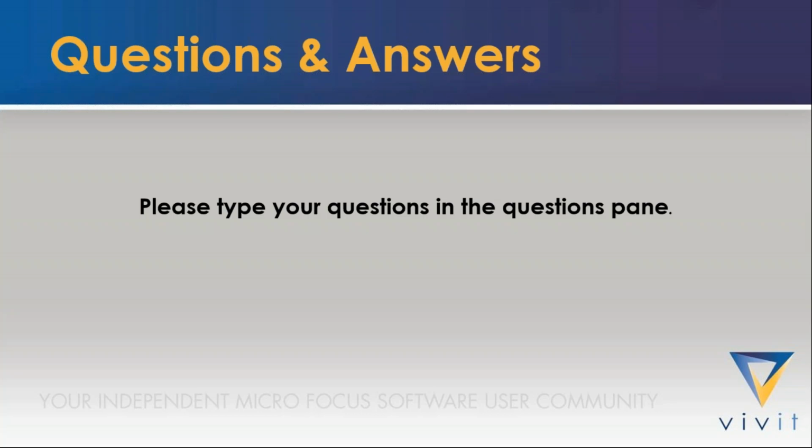So another question that's come up from Dinesh is, how long did the move from Service Manager to SMAX take you? It took us about 4.5 months, from project inception right to actual go live to production. And at that point, we're not running the two systems together. It was a hard switch off on the HPSM side, and SMAX came up, and that was the timeline.